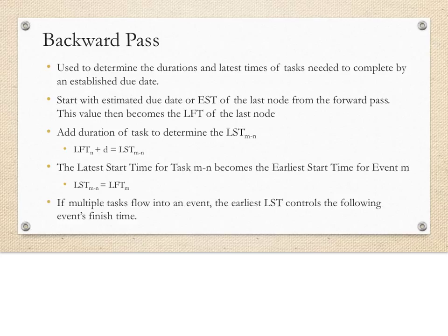Now, if multiple tasks flow backwards into a single node, the task with the least or earliest latest start time controls the event's finish time.